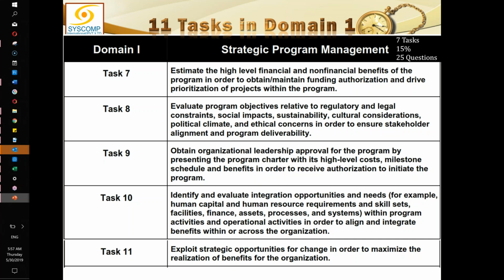Portfolio manager can interact with a standalone project, but he cannot interfere with the projects of the program. Portfolio manager may have the authority to altogether cancel this program, but it cannot say to the program manager to close down your X project. This is not something portfolio manager can do. So, in a way, all the projects included in this program are the babies of the program, and program manager is like a portfolio manager for those projects.